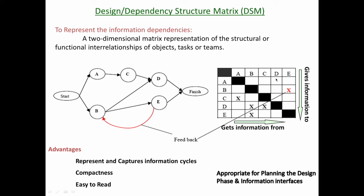What the design structure matrix does is take a network representation and allow feedback relationships. This whole network is then represented in the form of a matrix. Wherever there is a relationship, there is an X mark. Where there is a feedback loop, the X mark is above the diagonal; where all relationships are feed-forward, the X mark is below the diagonal. This gives a clue to the design team as to where feedback loops exist and how they should be managed. The matrix representation is much easier to draw and understand than a network, and matrix algebra operations can extract a lot of information on dependencies between design teams.